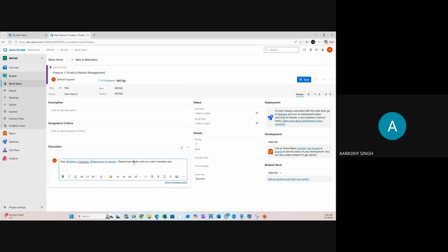So guys, in a production environment, in project development, nowadays customers and we prefer to complete all conversation and discussion directly through the Azure DevOps board. All your discussions will be available for life. Traceability will be easy and it will not be deleted by the system. If you're using Outlook, manageability is difficult, plus your data or discussion will be deleted after 6 months or 1 year as per the organization policy. So nowadays the recommendation is to complete all your discussion directly through the Azure DevOps board.